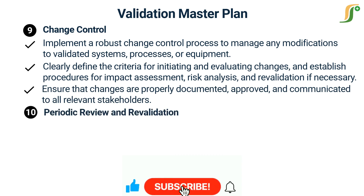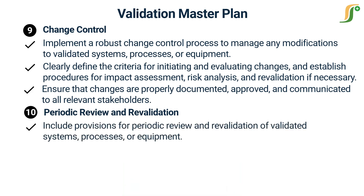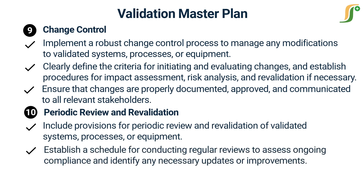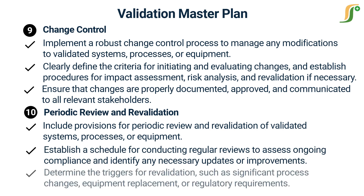The tenth step is periodic review and revalidation. Include provisions for periodic review and revalidation of validated systems, processes, or equipment. Establish a schedule for conducting regular reviews to assess ongoing compliance and identify any necessary updates or improvements. Determine the triggers for revalidation, such as significant process changes, equipment replacement, or regulatory requirements.